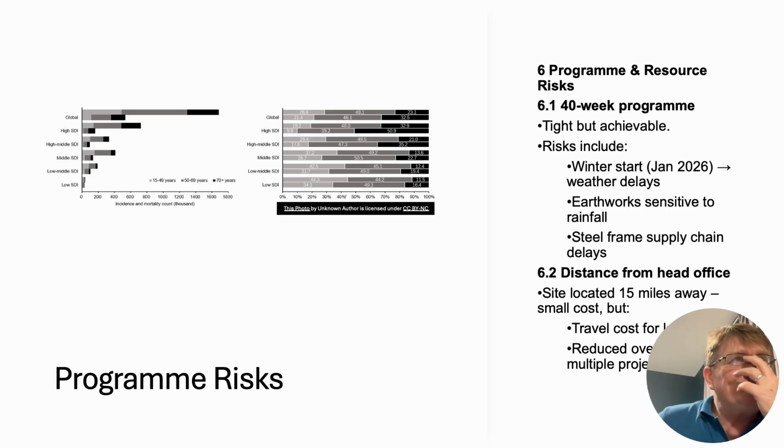For instance, is it fixed or fluctuating price as well? So it depends on some of the terms in the contract. Is it fixed price? Fixed price can be a nightmare, but some could say it's safer because if you're buying it at that particular price, it's going to stay at that particular price, particularly if you've got a 3-year contract, a 3-year duration for your contract. You want to be buying steel maybe at the same price today as you're going to buy it in 3 years' time. However, steel prices fluctuate because they're a commodity.